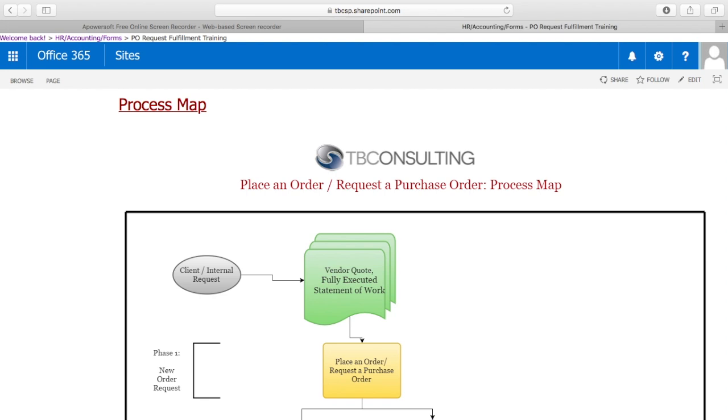In such a scenario, the engineer should follow the recommended steps. First being, document and share assessment discovery results with the project team. Based on discussion, approach vendor for vendor quote. Then, share vendor quote with account manager and project lead. Confirm if the bill needs to be passed to the client and/or there is a new price markup.